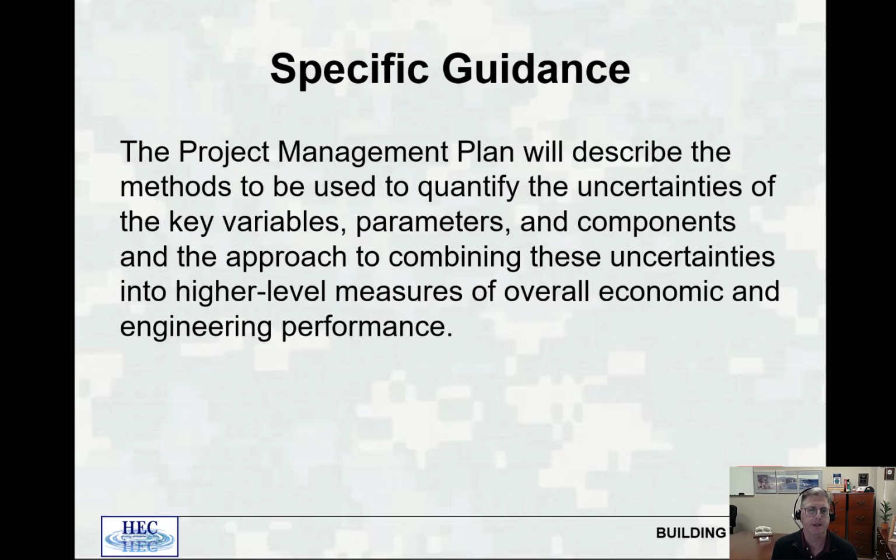Some more specific guidance. The project management plan, or PMP, will describe the methods to be used to quantify the uncertainties of key variables. The key is key variables, not all variables, parameters and components, and the approach to combining these uncertainties into higher level measures of overall economic and engineering performance. So in the PMP, you should define your key variables of uncertainty and then how those key variables are going to impact your analysis.